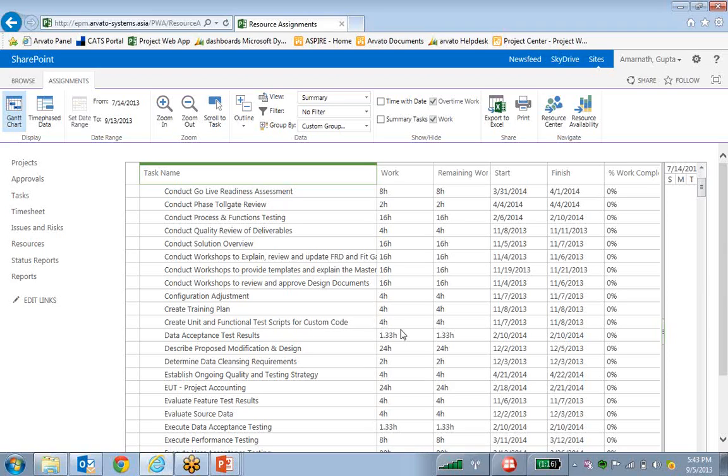No, once we have set up initially and we created a WBS, then if we are shifting one particular task, the related tasks, what is known as the critical path, it will automatically shift the entire critical path.